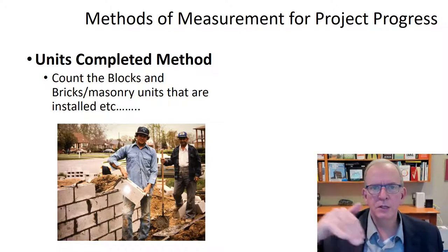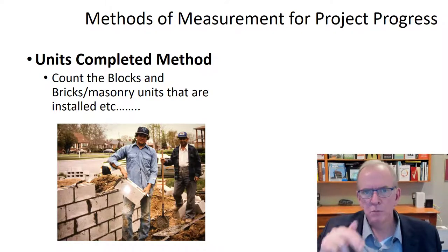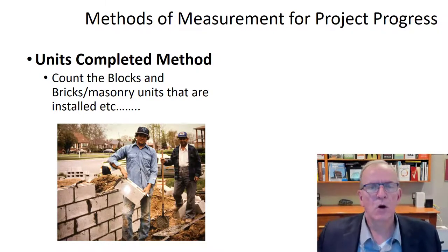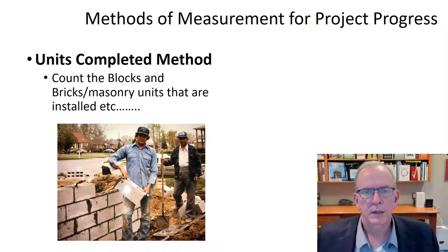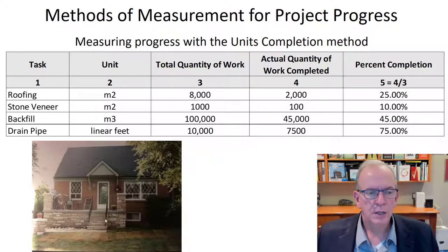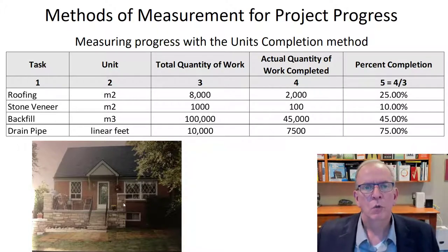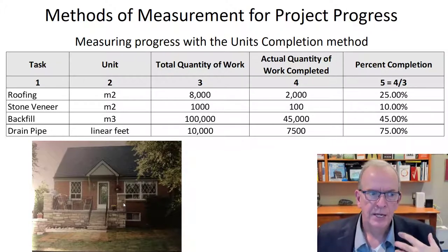But then if you've got all these little washrooms and angles and corners everywhere and small little walls with doorways and all these other things, there's no way that you're going to be laying those blocks as fast as you would in one long, straight, ginormous wall. So even with units, you have to do some factoring in if there's a lot of dichotomies when you're trying to do that measurement. So that does require some injection of experience in there.